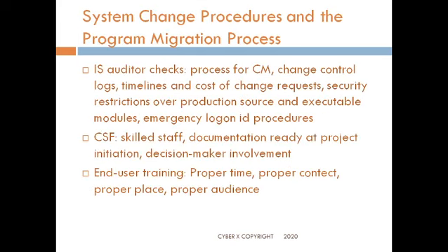So from the IS auditor's perspective, the IS auditor will check in change management whether the changes are being done as per the required change management, whether change control logs are present, and whether timelines and cost of change requests are there to be scrutinized. There are security restrictions over production source and executable modules.